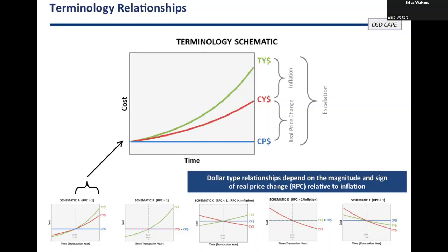And a lot of people think of that as base year dollars. So if you imagine how you would have built a cost estimate in the past using base year dollars and then add inflation escalation on top of that value later, you're basically building a constant price model. So the functions haven't really changed in terms of how you build a model and how you might want to normalize historical data. It's just making sure that you are using the right kind of index so that you're moving from whatever line you're on to the correct line for that type of analysis.